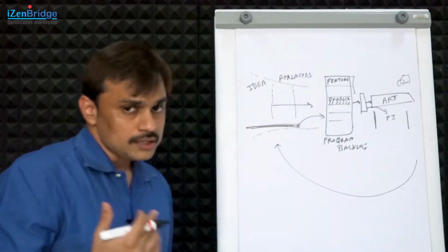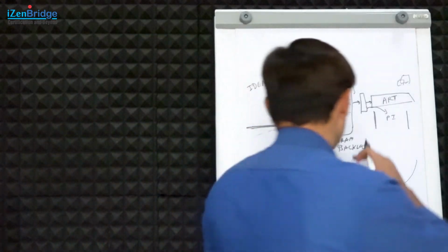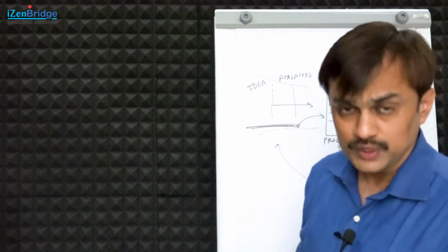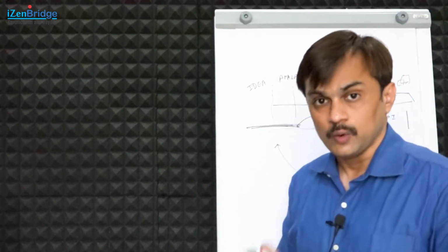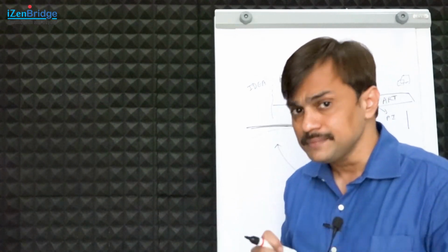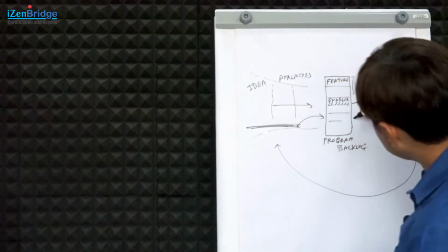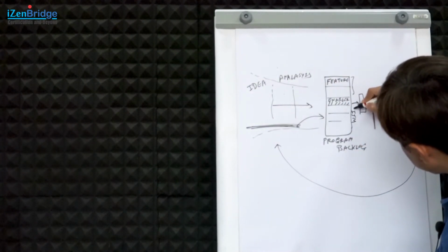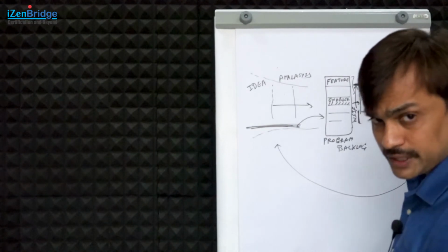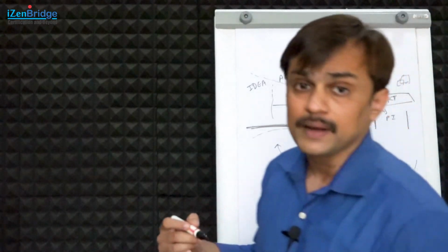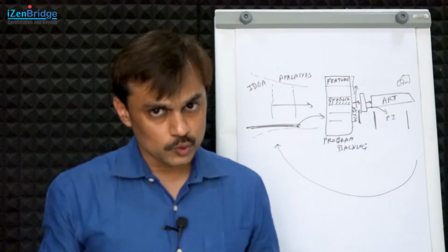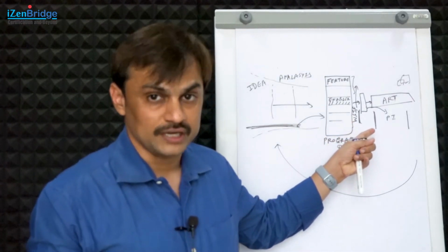Another thing which may come to your mind is, once I have, say, 20 features in my program backlog, how do I prioritize them? What is the process of doing prioritization? In your training you will learn more about it, but at a summary level we apply something called WSJF, which is, in the simplest way, ROI based prioritization. It is facilitated by product management, and in collaboration with various business owners, this prioritization process gets done.